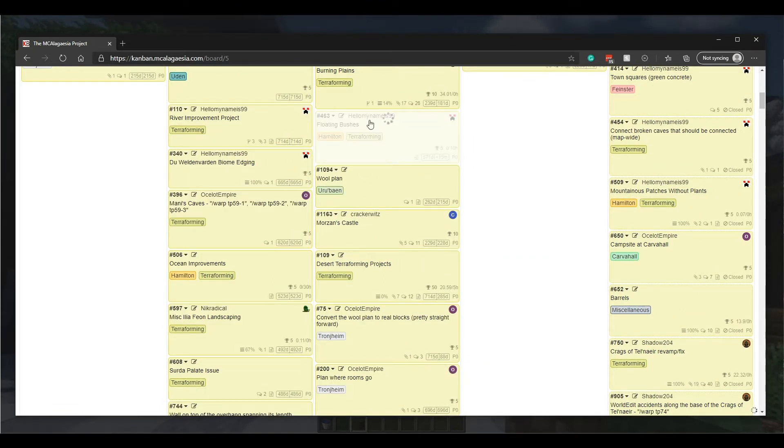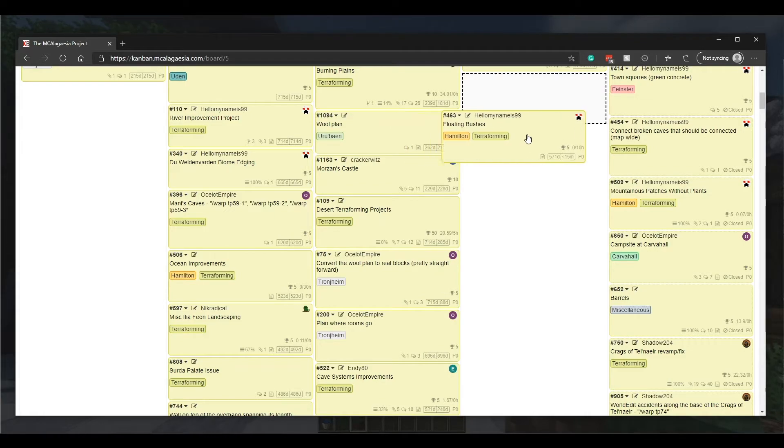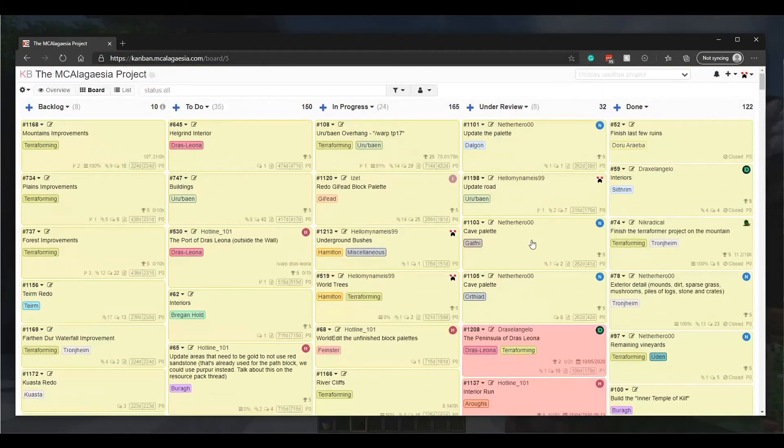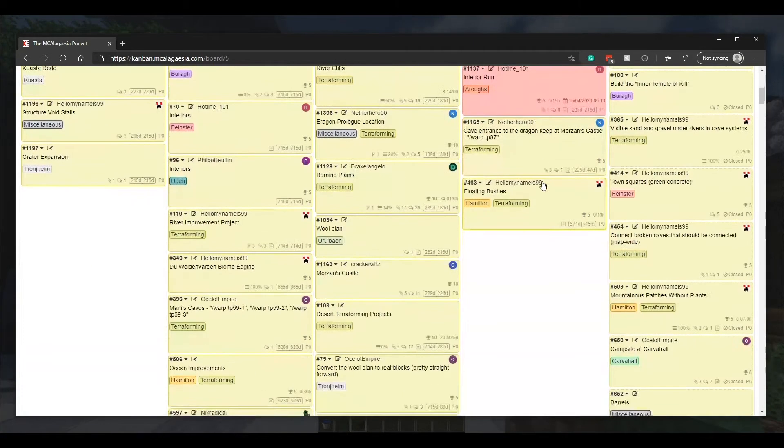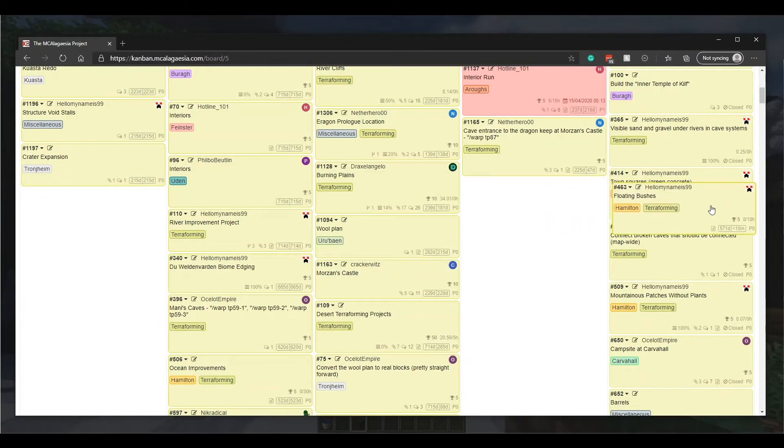This column of course contains all the tasks that are actively being worked on. Once you've completed the task, drag it into the under review column. This lets everyone know that you're done with the task and we can finish up discussion and talk about any changes that need to be made. When that's done, I'll move the task to the done column.